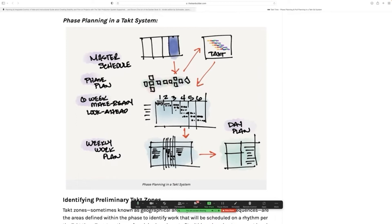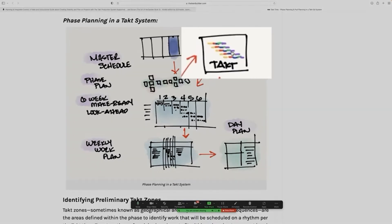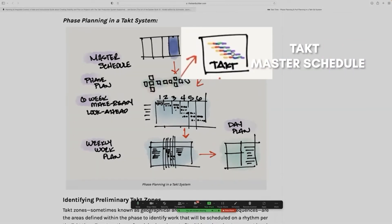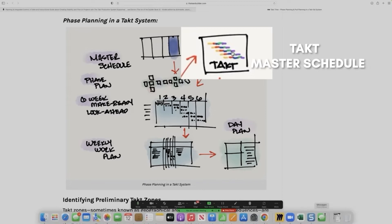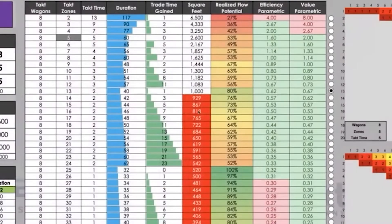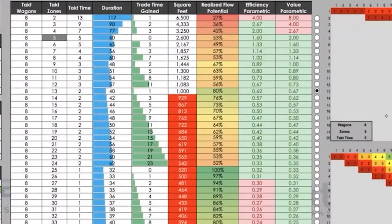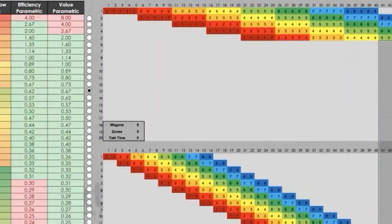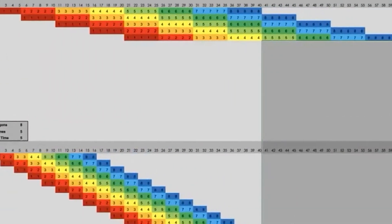And then that pull plan will enable you to create a tact master schedule. Because you were able to package that sequence together, you were able to optimize that sequence. Remember back over here to this little Excel template that I was showing you. Optimize the sequence to where you're actually finishing when you ought to finish.